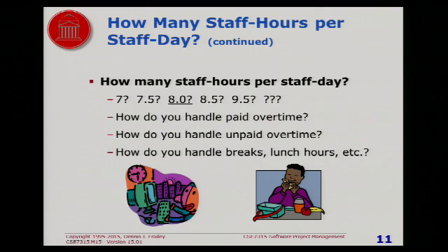In other words, your competitor is going to pay the employees the same amount, but make them work a half an hour more each day. So it appears as though they're cheaper. But maybe they are and maybe they aren't. When you do work for the U.S. government, they determine how many hours a day you have to use because they don't want companies fudging these numbers in order to be more competitive. They want everybody to be using the same numbers.